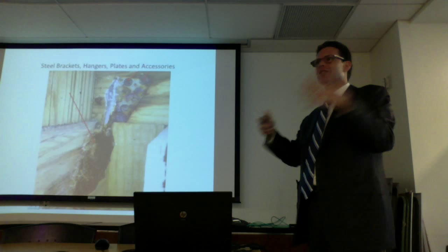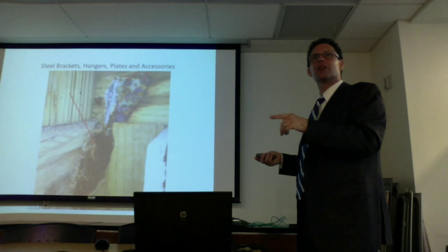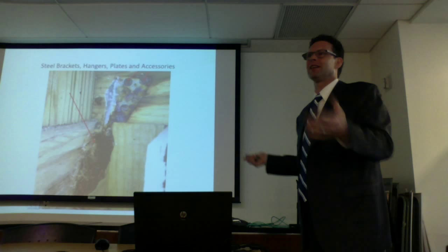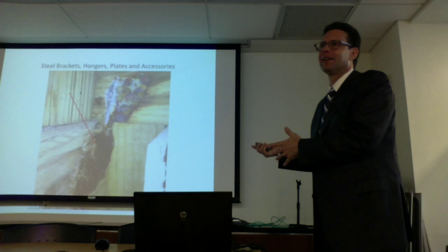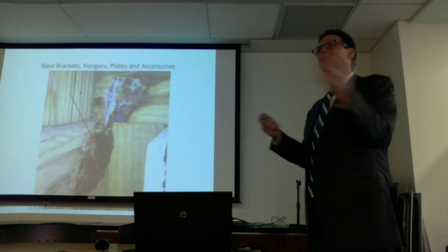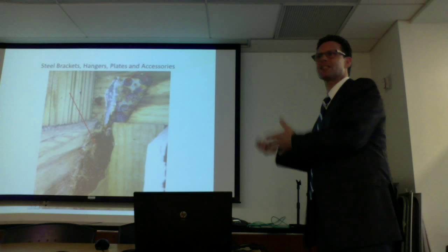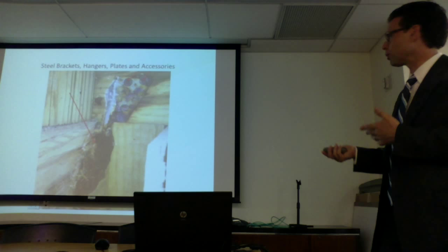It's bad. The IICRC says after a flood event, you're supposed to pressure wash all this stuff. Nobody did it. Nobody knew to do it. Adjusters didn't write it. My clients that I knew pre-Sandy that called me up, I said, get a guy out there and just pressure wash everything. Well, it's going to be wet. It's already wet. Wash it, gut it, pressure wash it. Don't dry it, gut it, pressure wash it, then dry it. And then you'll prevent this type of stuff. The IICRC S500 says to do it, yet nobody does it. Nobody puts in for it. It's not there. It has to be replaced.